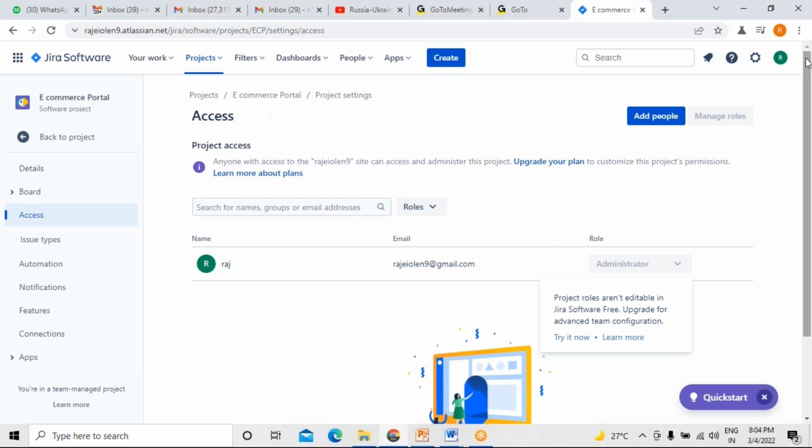Only after completing two or three sprints do we give the actual estimates, and based on the velocity, this is the number of sprints that will be required for the release plan. Yes, based on the velocity, we calculate how many more sprints are required. Okay, fine.